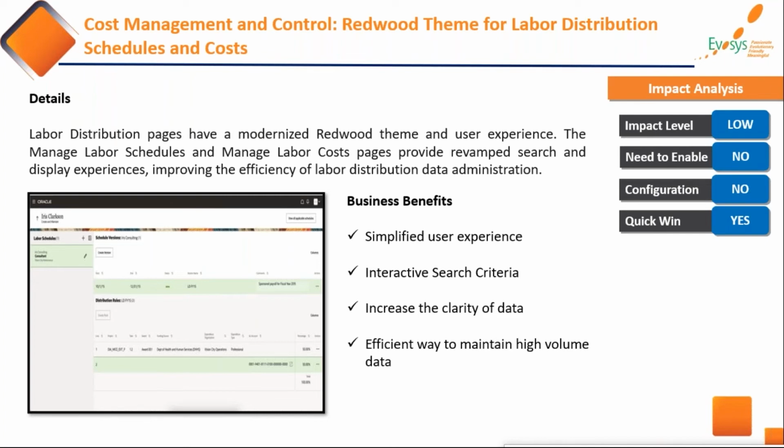So what generally happens is that the payroll pushes the data into one particular screen, which we call the labor distribution screen, and there the necessary allocation against the project can be done for that particular payroll cost, and from there that data is pushed to the project.